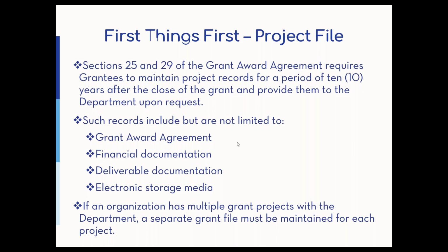Make sure that you have all of these things included in that, the grant award agreement, the financial documentation, deliverable documentation. If you have any external electronic storage, keep that. You have to keep it for a period of 10 years. If you have multiple grants with the division, make sure that you keep separate files for each grant.